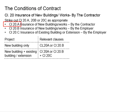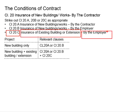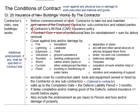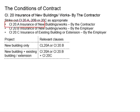Clause 20A is about the insurance of new buildings or works by the contractor. Clause 20B is about the insurance of new buildings or works by the employer. The insurance here refers to the Contractor's All Risk insurance, also known as CAR. The meaning of striking out clause 20A, 20B, and 20C as appropriate is that at least one of these clauses will not be relevant.